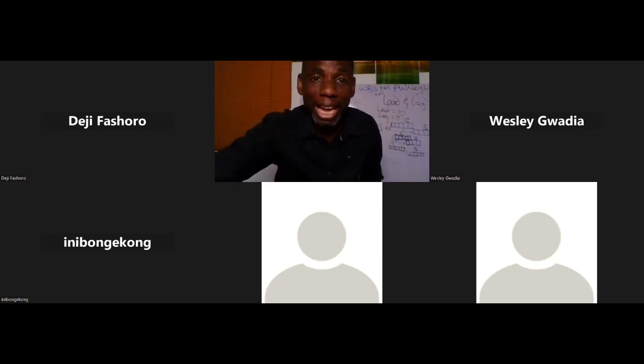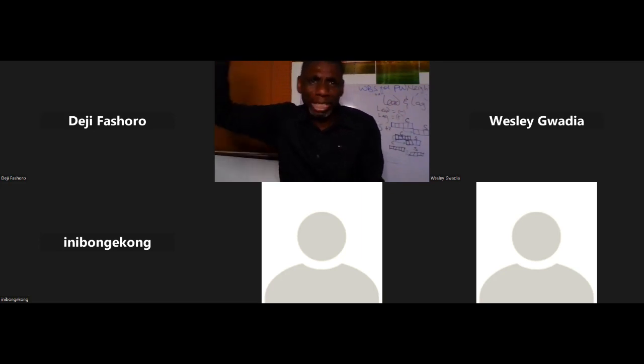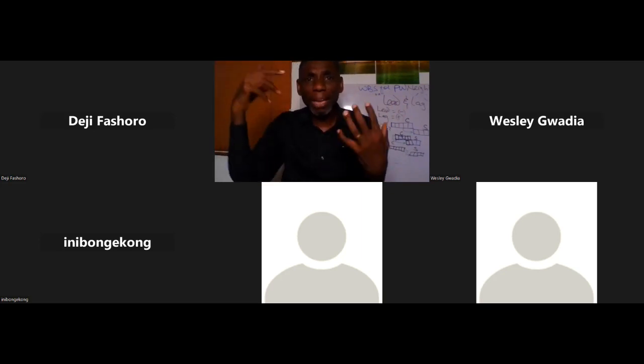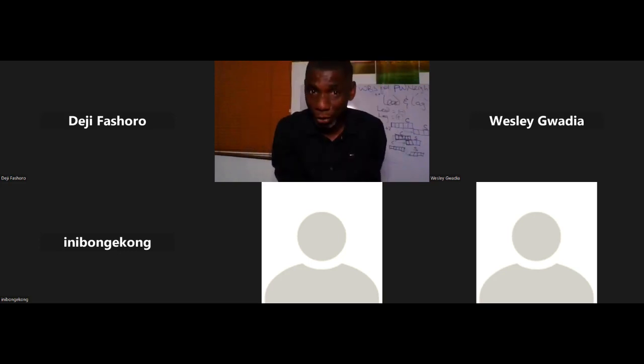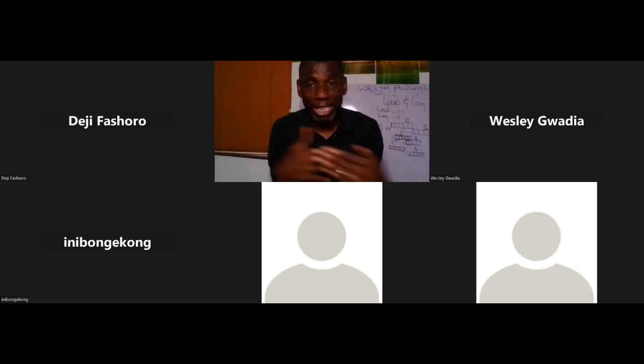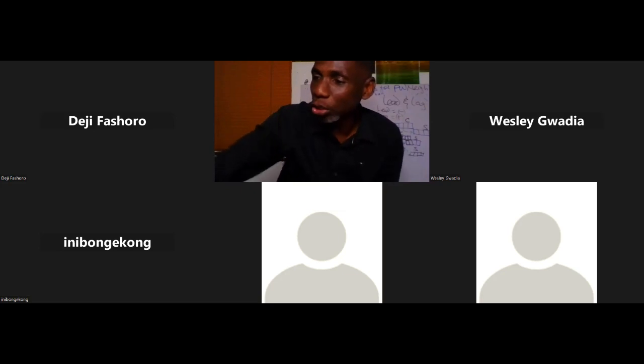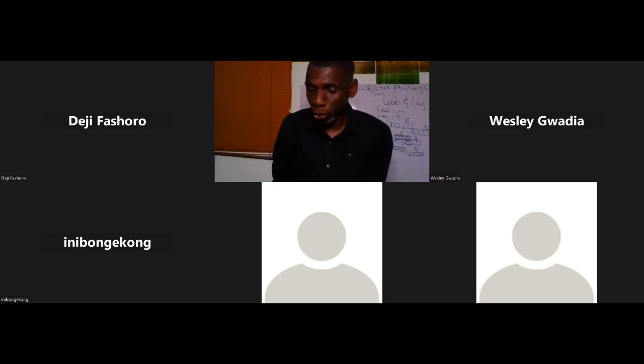And you can sit today and know in 4 years' time how much you're spending in maybe week 25, week 38, week 48, because MS Project will collate all the activities for that week, depending on the task dependency, the relationship between them. It will collate the cost and give you budget this for this week, budget that for that week. So that's just the summary of what I want to introduce us to on MS Project. Install the software, practice it by yourself, and get back to me. Let's have the one-on-one class.